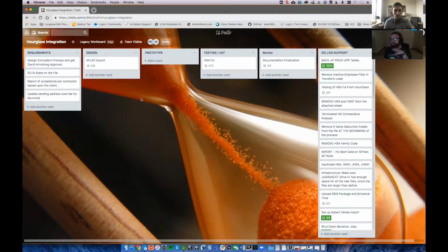Now, I'm showing you a project that's totally completed. And again, this is kind of traditional, kind of agile methodology, and it's hybrid on purpose because most people don't understand what the word sprint is. Traditionally, a sprint is a series of deliverables that are in a column that are ready to be worked on, that are only being worked on, and then you have a backlog of everything else you're going to work on. Sometimes we don't have that luxury, right? Everyone says, we need all of these done now.